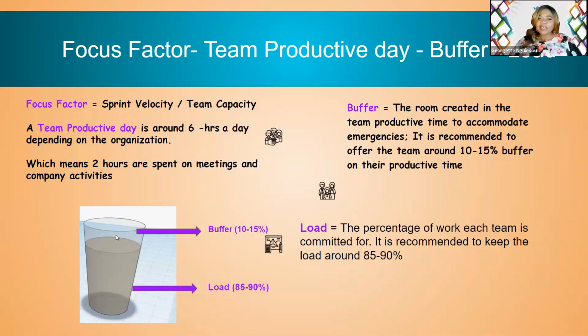Is it safe to do that? Not really, it's not advisable. So you want to give them some room. Depending on your company, or you as well, depending on your team behavior, you can give them something between 10 to 15% buffer. So this is what we call buffer, right? This is the room that you leave.